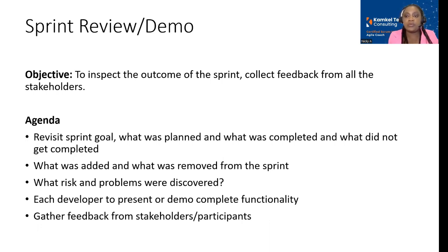So on the last day of the sprint, you're going to have your sprint review, right? And as well as your retrospective. The whole purpose of your sprint review is for the team to inspect and adapt, right? The team comes together to talk about how the sprint went, to see where they started and where they're at that point. And then during that sprint review, the team will do something called a demo to the stakeholders and get feedback from the business or from whoever is on the call.